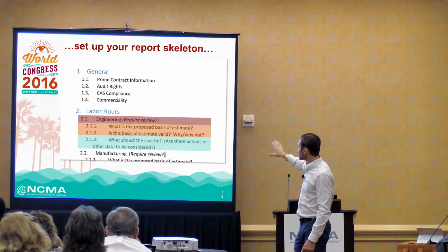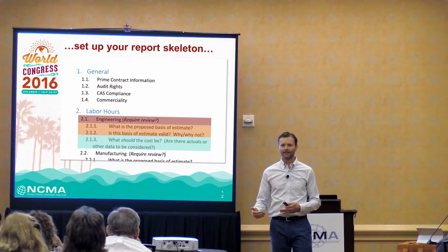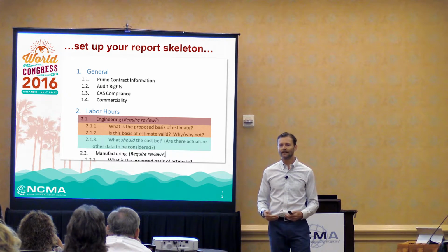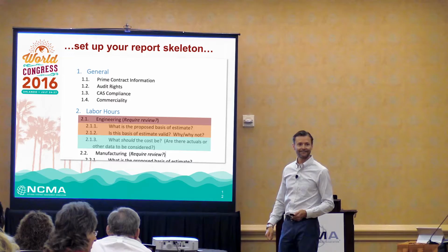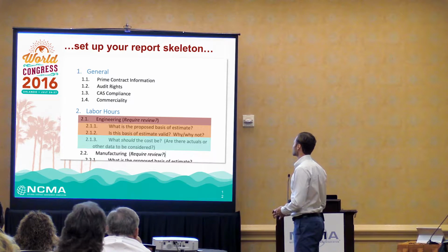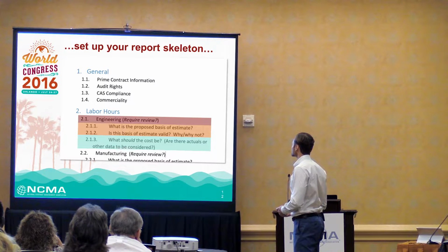Second, what's the proposed basis of estimate, and is this basis of estimate valid and why? So you're just gathering information, right? If you don't understand the basis of estimate, then you don't have a basis for doing an analysis. If at the end of the day they don't have a basis of estimate, they've got an unsubstantiated cost, and that's a pretty easy one. Those are easy to analyze, right? Yeah. Gone. Yeah, exactly.